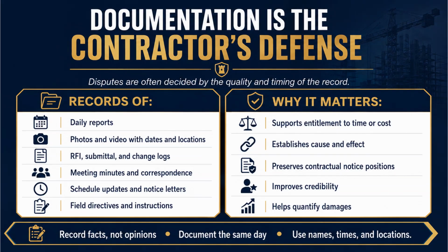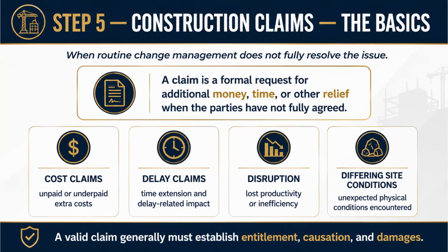Record facts, not opinions. Document the same day. Use names, times, and locations. Same 3 rules, every class, all unit. That's not repetition for its own sake. It's because these 3 habits are what win or lose disputes. Make them automatic. Step 5.